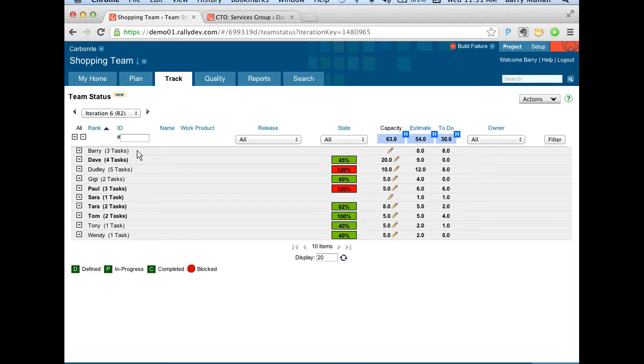Team members basically get to set their capacity. So for this team, I can give this many hours in this iteration. It's a very simple number, a very simple calculation. It's basically how many net hours can I give, net of all the other things you've got to do. And typically, if you're fully devoted to a team, it's going to be somewhere between 60 and maybe 70% of your total hours worked that week.